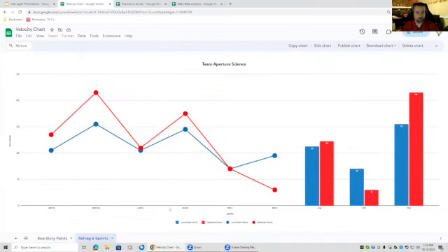And it's really simple. All we're charting is the most, and in this case, for this team, the 6 most recently completed sprints. The blue lines show what they committed to at the start of the sprint. The red line shows what they actually delivered and got done. And then we've got some simple bar charts that show you the average, the min, and the max.